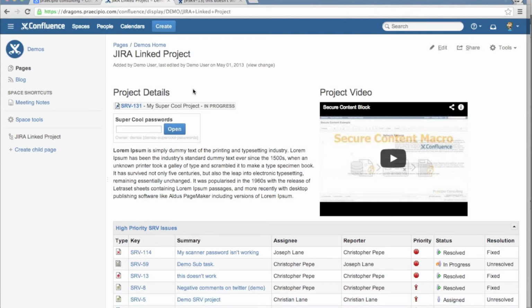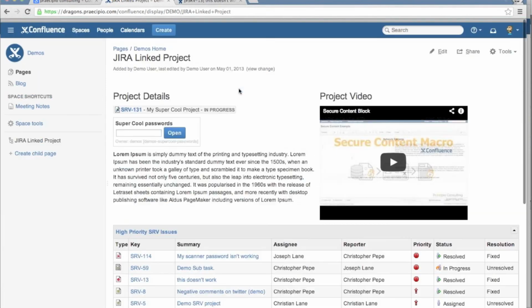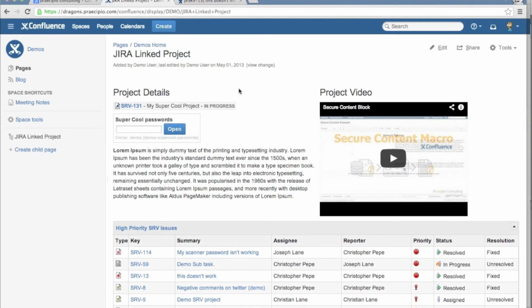Organize your pages into page families so that like things are linked together. Here we don't have any children off of this. Off of our other page, we made our children. But have a top-level page which encapsulates an idea, and then build your children off of that. Just like in Jira, what you would do is encapsulate an entire user story or some big idea in a ticket, and then have a bunch of subtasks that break that out into smaller, more manageable pieces.